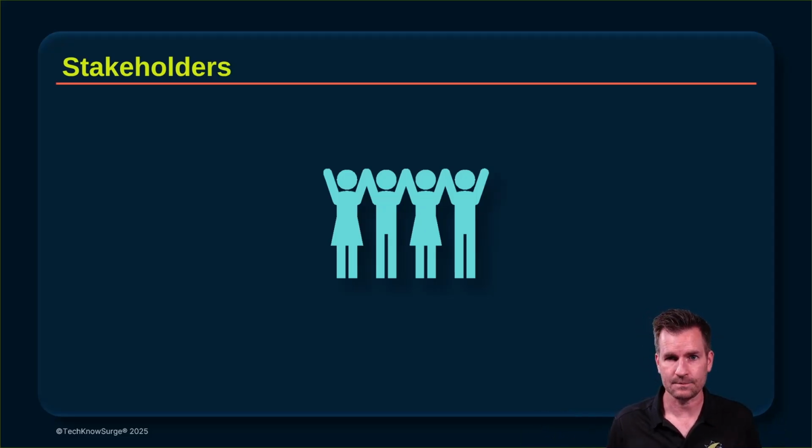So let me give an example. Let's say I'm making a change to the software that our customers are using. That could stimulate some calls, get some of our customers to call in to our customer support team. So if I'm going to implement this change, I probably should let the customer support team know that my change could affect them. So I'll add them to the stakeholders list so they understand and get communicated to of what changes are happening.